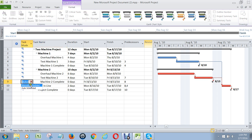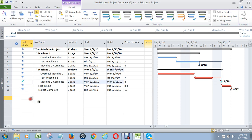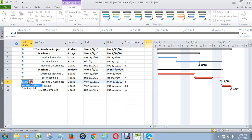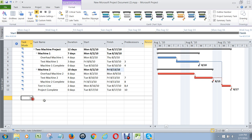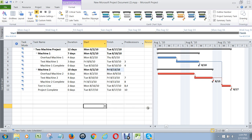And the last thing is: don't ever let this happen where you've got a manually scheduled task in there, because you want Microsoft Project to automatically update dates. That's pretty much how you create your schedule.